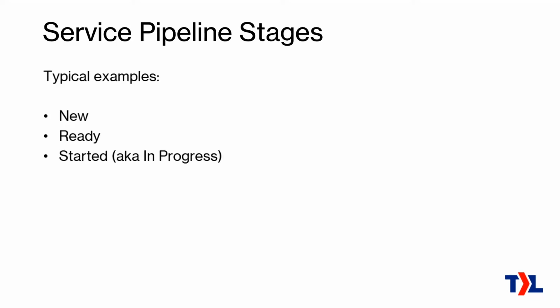Started, which people also call in progress. That is for everything that the engineers have started already, and that they could work if they so chose. It's not actually showing what's being handled at this very moment, and that's kind of why we prefer the term started, because in progress does sound like we're working on it in this very moment. But that's not actually the most important thing to know about it.